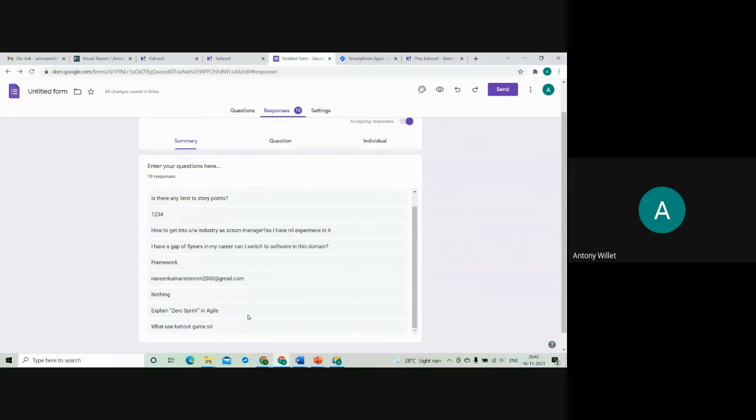some analysis, but they cannot have any product increment. When I say product increment or sprint increment, they have to show a demo of that result to the customer, right? So they cannot run a sprint yet. They need to do some basic analysis and basic study, or the team needs to undergo 1 week of training, because some part of the domain or the programming language they want to use for the project is new to them. So they run something called a zero sprint, or no feature sprint.